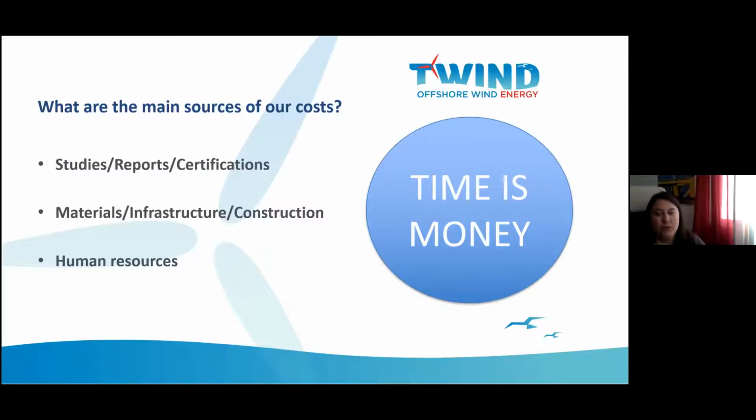So how can we reduce the time at different stages of the project? How will time affect our studies, reports, and certifications? So for example, in all these cases, you're mostly hiring a service. So the longer it takes for them to fulfill that service, the more money it will cost. It's as simple as that. So how can we reduce that time?